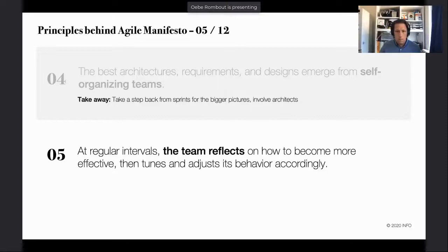In our project, at several stages, it came up that the sprint duration was too short. That came up especially during retrospectives at the end of the sprint. And after questioning this a few times, we looked at it and we decided to switch from 2-week sprints to 3-week sprints.